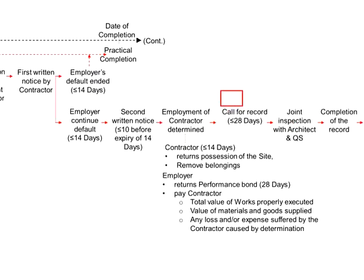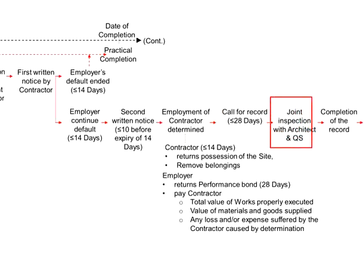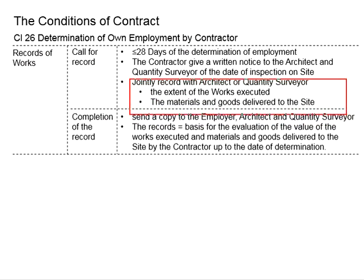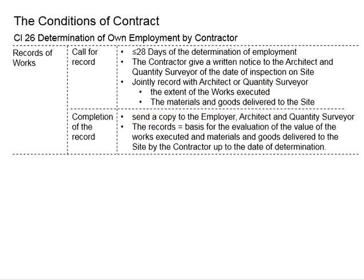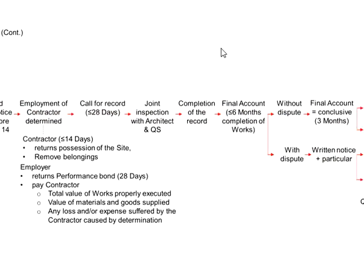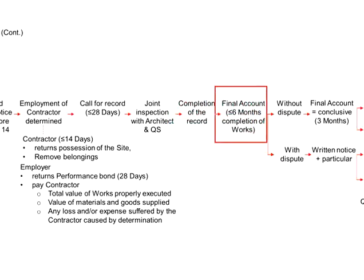Within 28 days, the contractor shall call for a record. There shall be a joint inspection with the architect and quantity surveyors. The purpose is to determine the extent of the work that has been executed, as well as the materials and goods delivered to the site. Once this is done, the contractor will have to compile the record and come up with the final account within 6 months of the determination of employment.